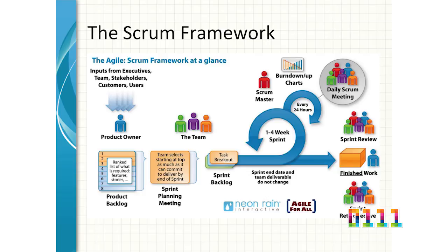And the typical software Scrum sprint size or length is 2 weeks typically. But sometimes hardware scrums require a little bit more time. I've heard hardware teams using 1 week sprint times, and I've heard hardware teams using 4-week sprint times. So it really depends on what it is that you're trying to build and on the receptiveness of your team.